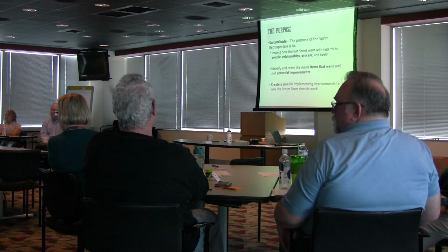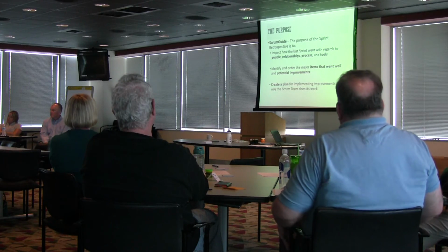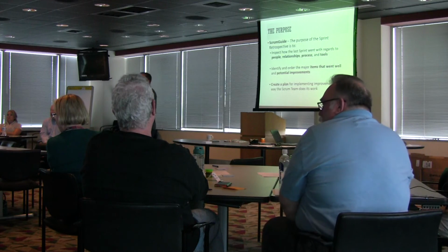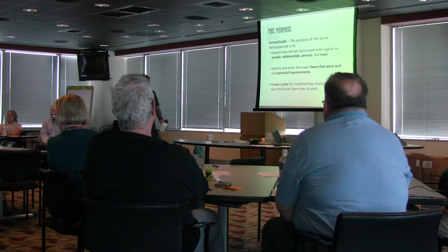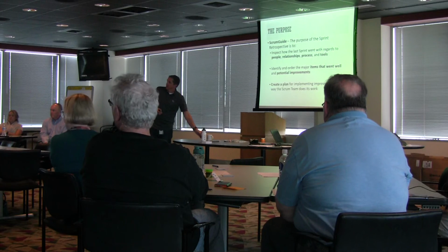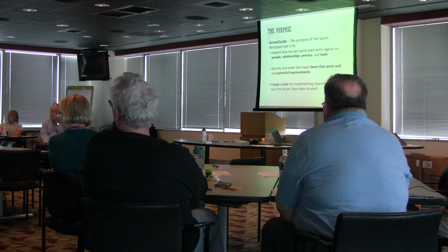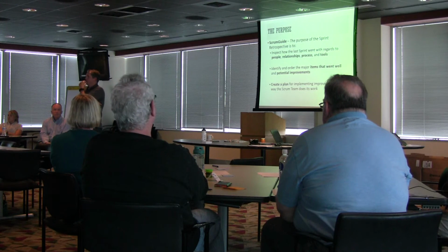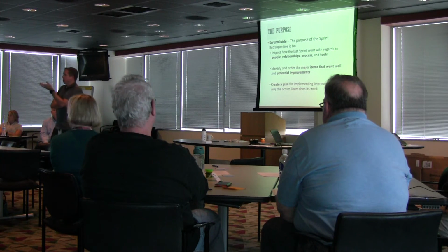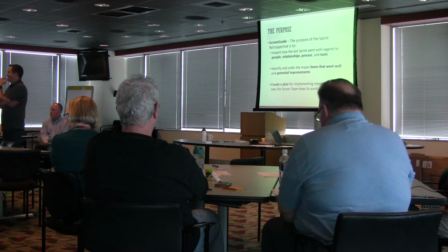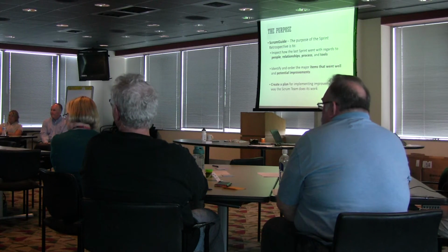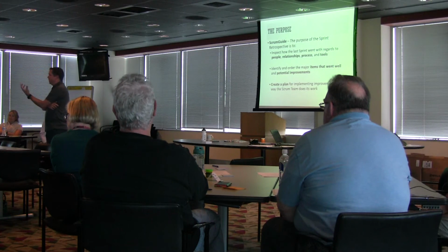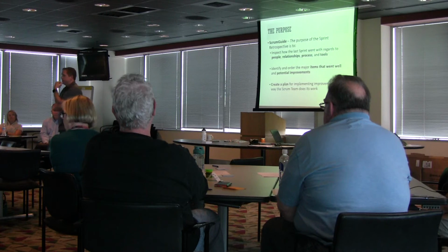Yes, sir? I think there's an important distinction on the items that went well. I think it's most important to talk about items that went well that you didn't expect, that surprised you. Items that went poorly that you didn't expect to go poorly. Because those are the outliers. So do you have an example? I agree with you. Having the conversation about these things and everything in between is a good conversation to have as a group.